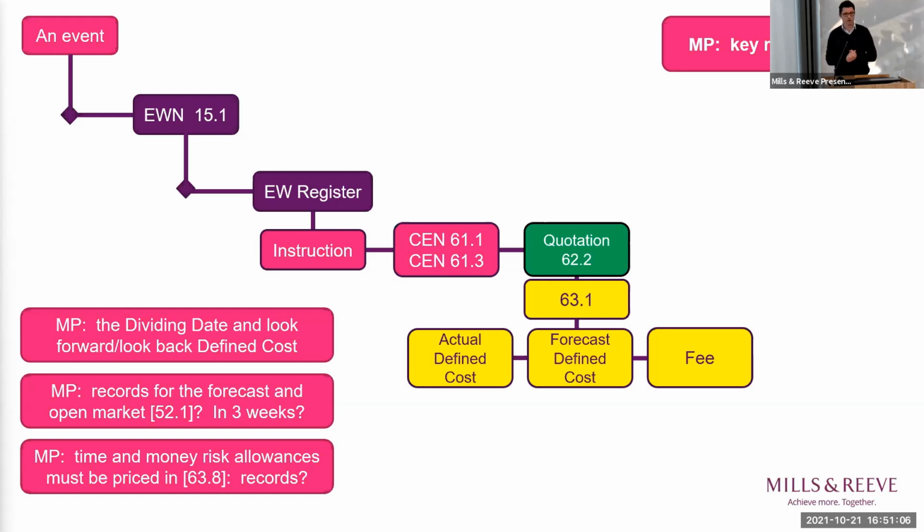Similarly, there's a lot of pressure on the project manager to respond to that quotation within the 2-week window. And that is why, in order to enable the response to be an effective one, it's important to go back to the early warning regime and the records and the discussions which should have taken place as part of the day-to-day contract management. The other issue for the contractor is that it needs to include a time risk allowance within its forecast. And again, that places a little bit more pressure on the contractor to ensure that is an accurate forecast.